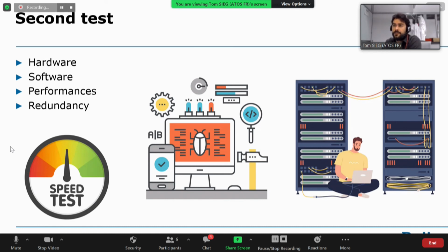So at the beginning, when you just have a little software installation, I mean just a Linux on compute node and management node, the easier way is to do a Firestarter or to push some kind of stress test at the beginning of the software installation.